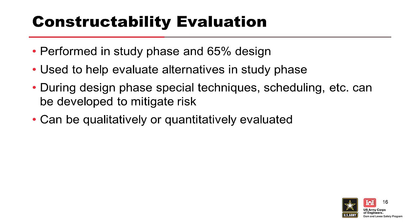Constructability reviews should be performed during the study phase — that is alternatives development — and also during design, which for the Corps we typically perform at 65 percent final design. During the study phase, alternative risk management plans are formulated and construction risks need to be considered in selecting a risk management plan. If construction risk is not considered during the study phase, a plan may be selected which is not feasible to construct due to intolerable construction risk, and could lead to unexpected delays and significant cost increases.